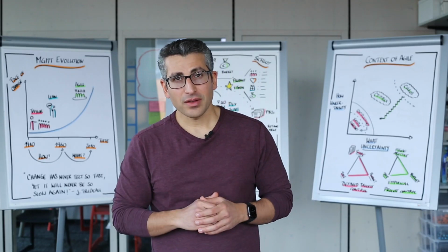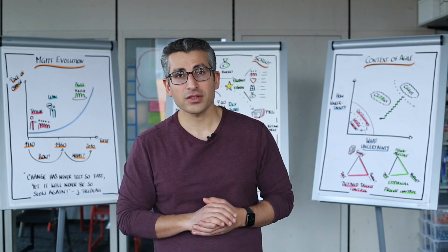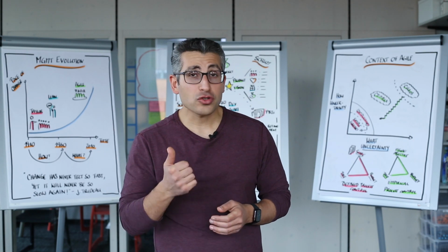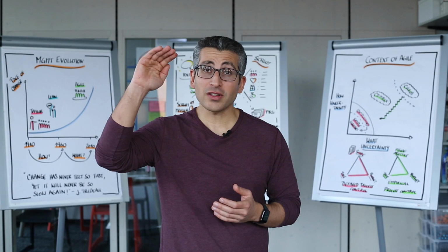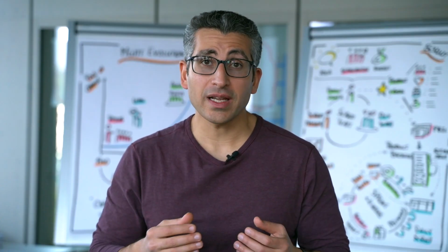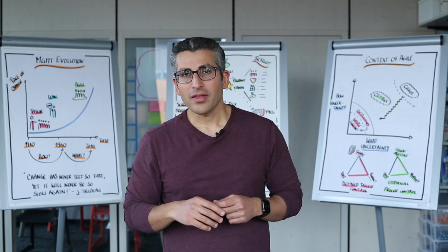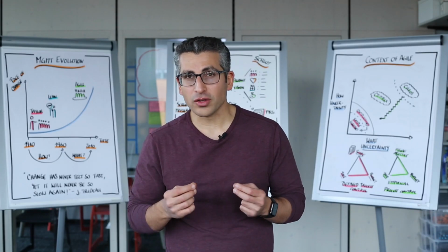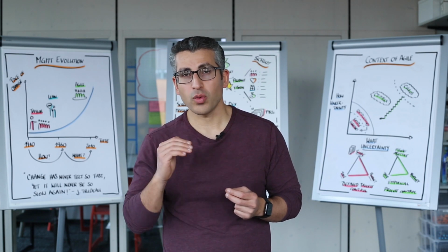The position they go back into the product backlog depends on the product owner's decision. If they're super urgent and very important, the product owner might put them at the top. If they are less important and less urgent, the product owner might prioritize them further down. The important thing is that it's the product owner's decision to put the items in the appropriate place within the product backlog.